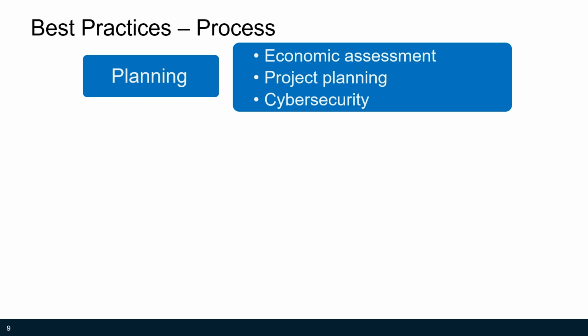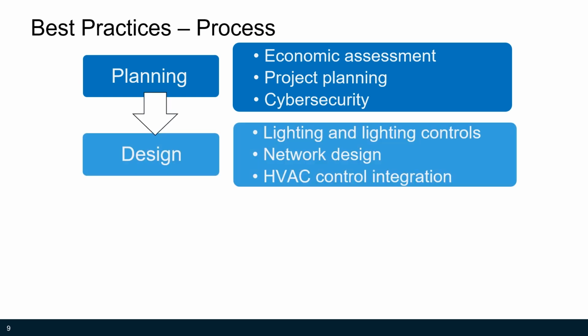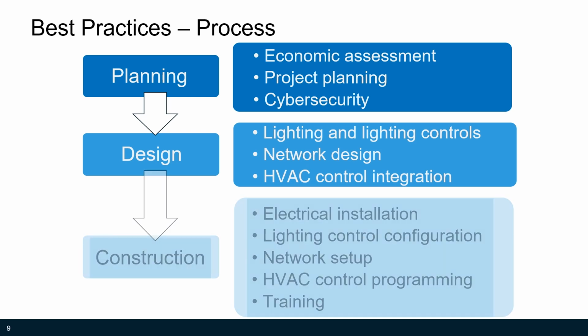Cybersecurity, covered in more depth in a subsequent video, is an important part of any HVAC integration project. Bringing the facility's IT staff into the project early will mitigate issues down the road. The design phase of the project includes elements surrounding lighting controls, network design, and HVAC control integration. The construction phase includes the installation and configuration of the controls.